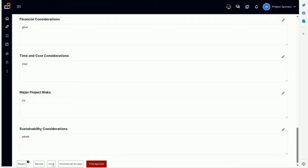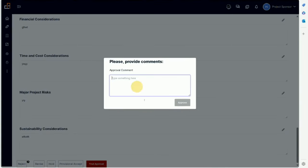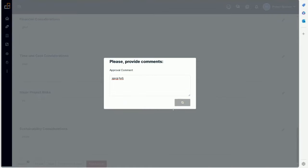Then you push this button. There may be some provisional acceptance where the sponsor can accept and basically authorize the team to proceed, but is saying look, we still have a few things to do before I can give you final approval. Then final approval. In this case, I'm going to say let's approve, so final approval. You have a box to make comments and then we say approve. In a way, this document now becomes like the charter of the project.